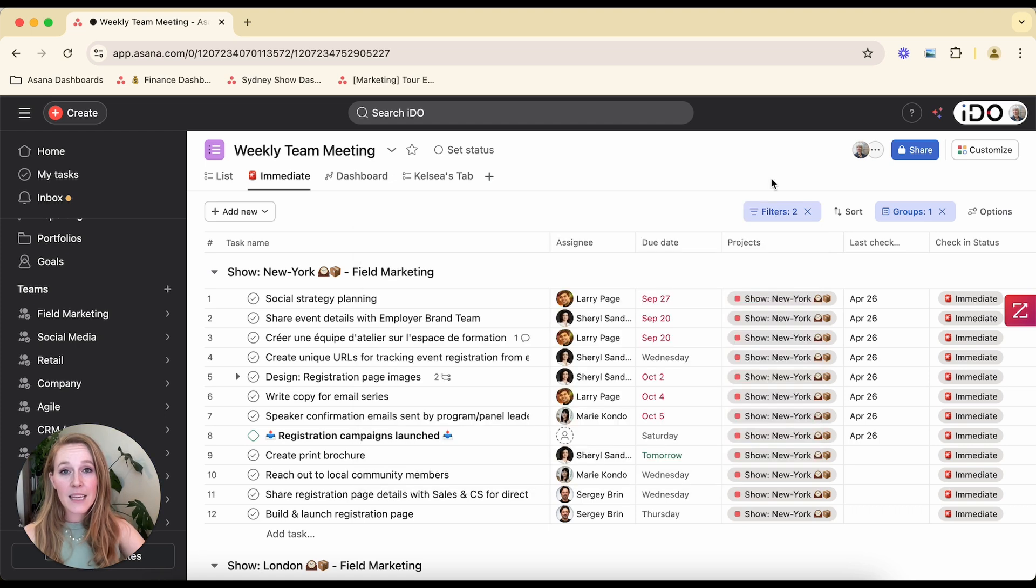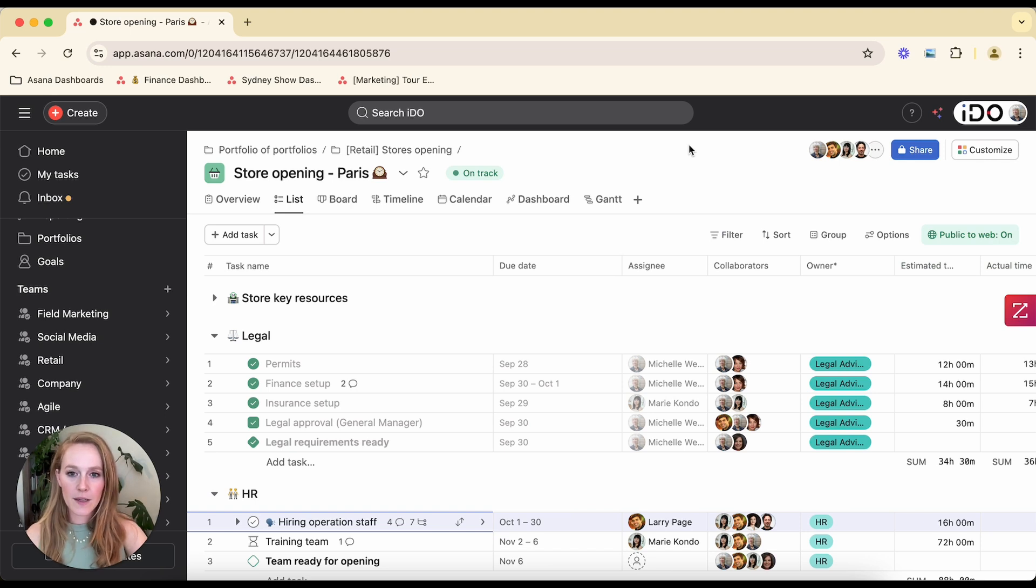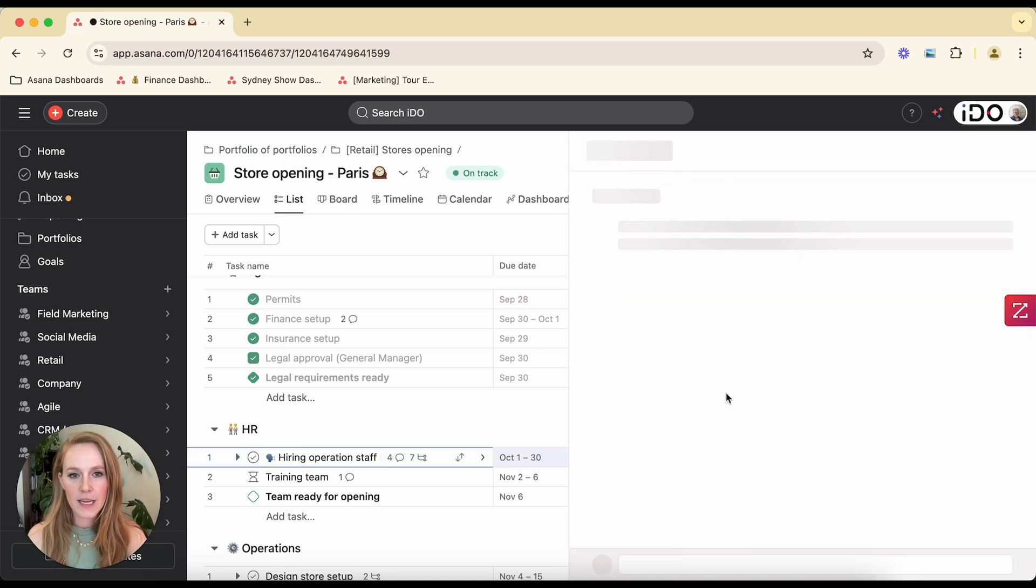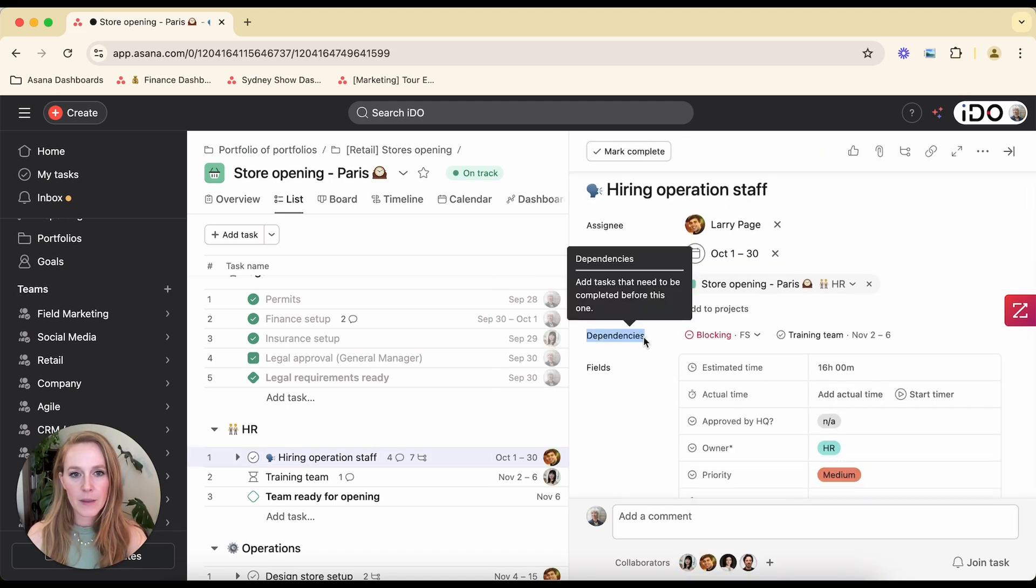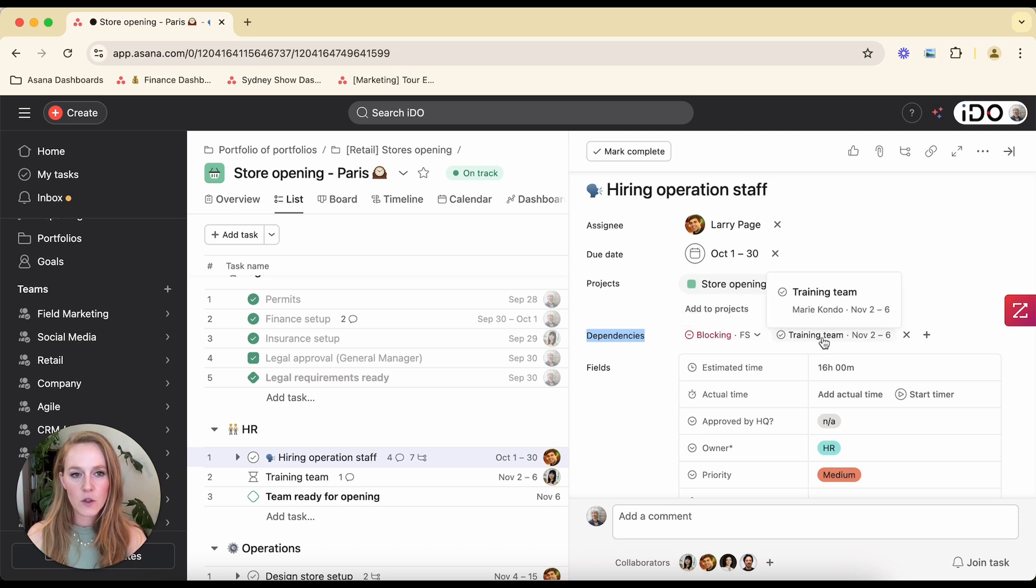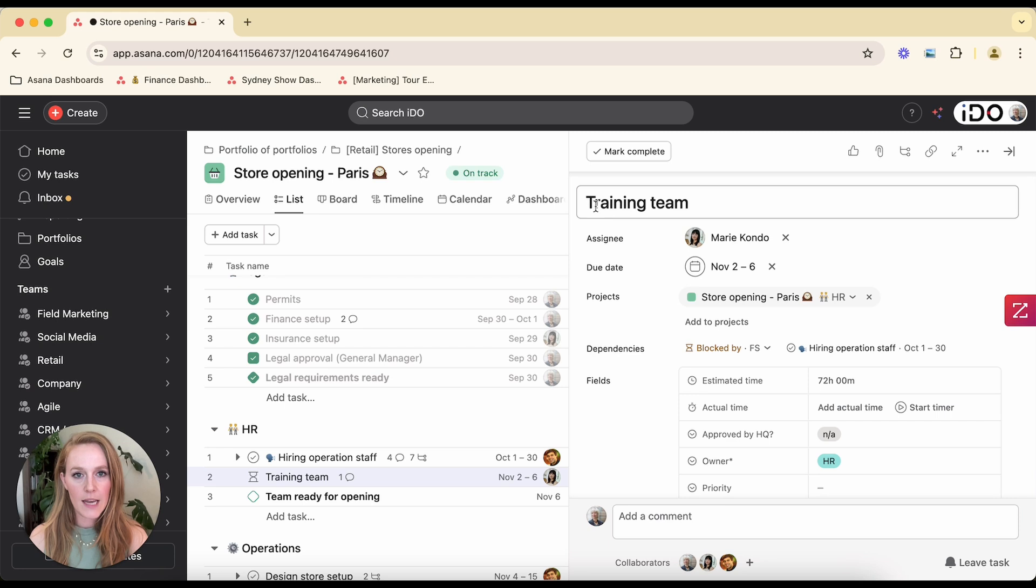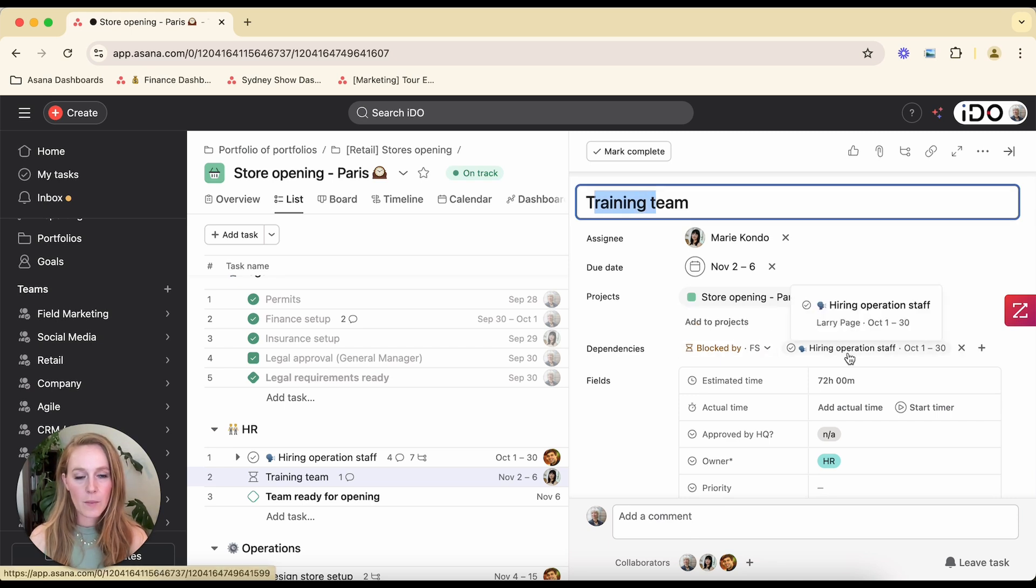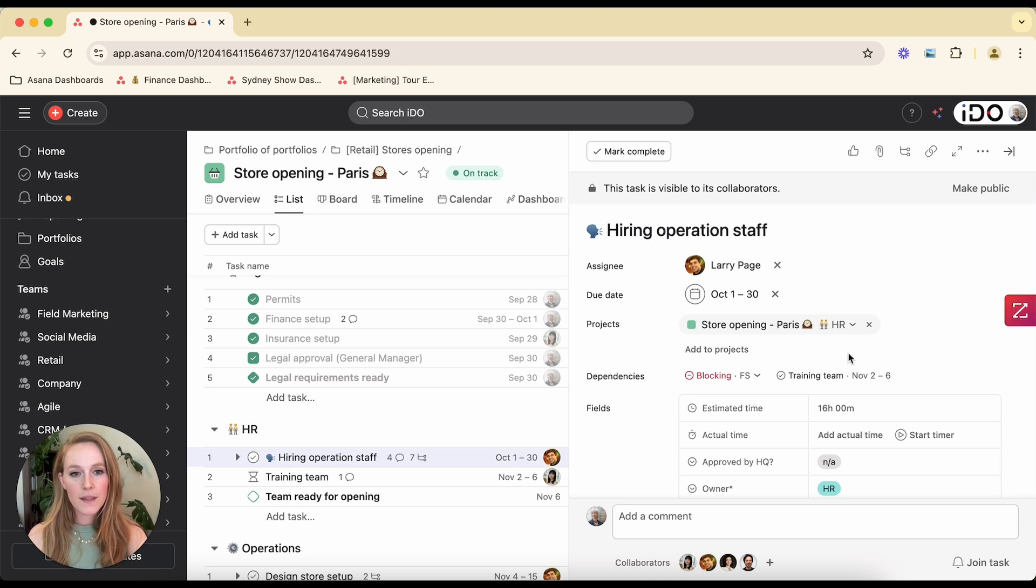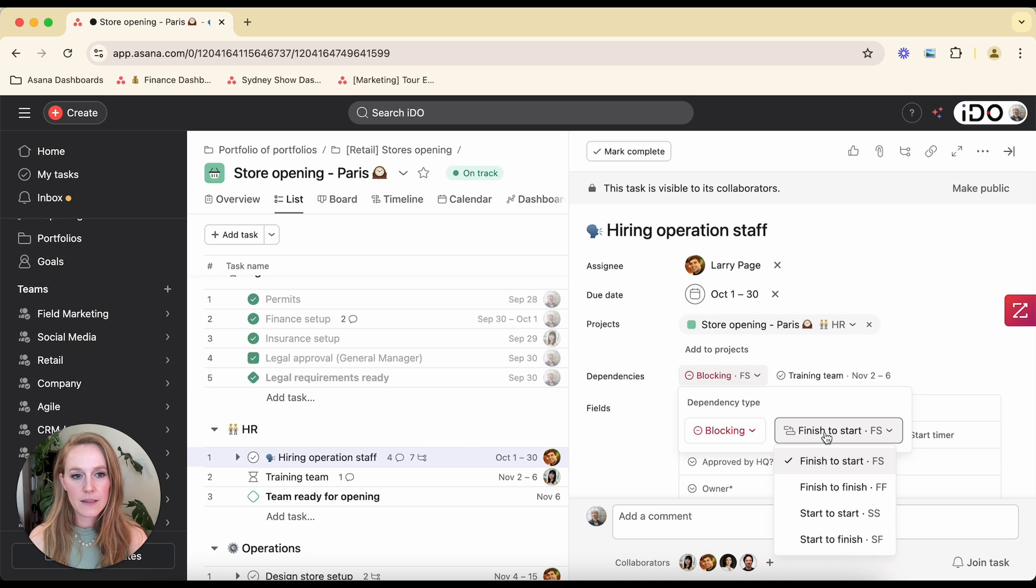And lastly, I want to talk about dependencies. So you can put dependencies within Asana. So let's take a look at this store opening for Paris. I can make dependencies between these tasks. So let's look at the hiring operation staff. If we open this up, we can see that there's a dependency here. This task is blocking this other task training team. So I can see here if I click on that, that's actually clickable. I can see and click into that training team and see what's going on and vice versa. Now I'm in the training team. I can see that it's blocked by the hiring operation staff and I can click back into it. Not only can you mark these tasks as dependent, but you're also able to set the dependency type.